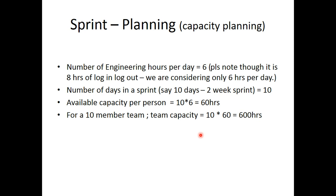This is the Capacity Planning math per person for a 10-member team. The number of engineering hours per day per person is 6. Number of days in a sprint is 10, which is a 2-week sprint. Available capacity per person is 10 × 6 = 60 hours. For a 10-member team, the team capacity is 10 × 60 = 600 hours. At the end of the sprint planning meeting, using Jira Query Language, we can see how many hours each person has planned for — bringing transparency and collaboration.